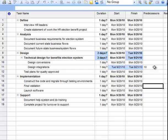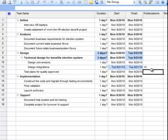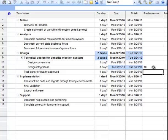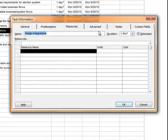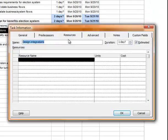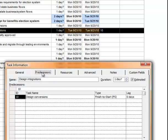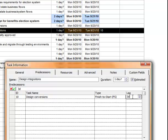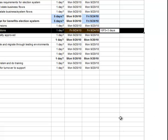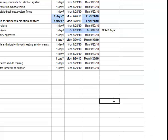Let's say I want that task only to finish after task 10, but also 3 extra lag days. That's getting a little more fancy, and to do that I'm going to double click on row 11. Then with my task information box, I will go to predecessors and enter 3 days as a lag time instead of the default of 0. When I press OK, I can see that the additional lag time is entered.